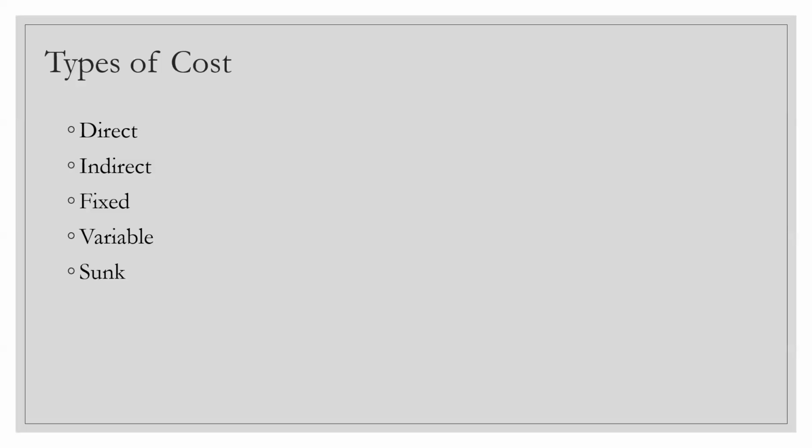So at that point of time, it takes a lot of courage for the PM to walk up to the sponsor and the key stakeholders and say, we have spent close to $30,000, but I think it's good to terminate the project right now because we are not going to get any return on investment on the project. Now, why is this a courageous step? Because most of the time, in a project, the project manager or the sponsor or the key stakeholder will all be pretty much inclined to see the completion of the project, right? They all want to complete the project. Put a check mark there.